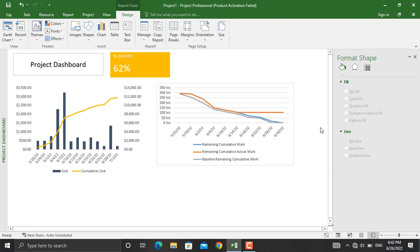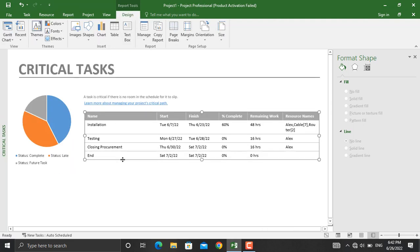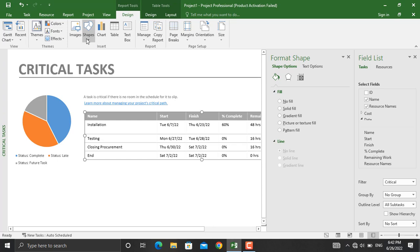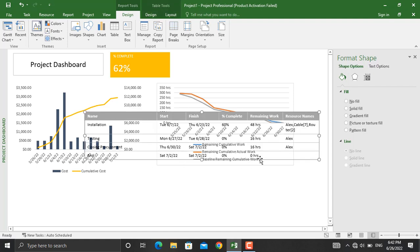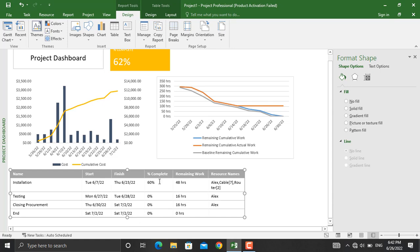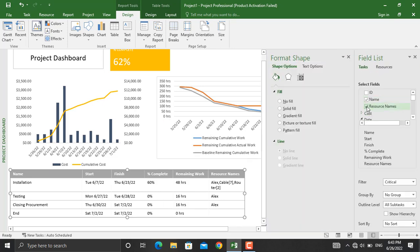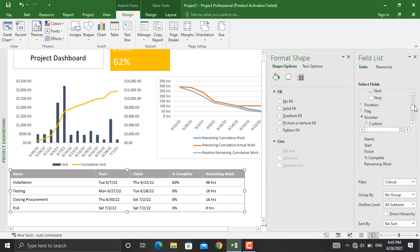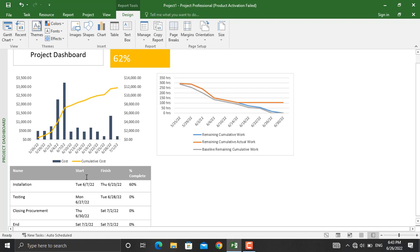Next, let's add the list of critical activities. Go to Report, then In Progress, and click Critical Tasks. Copy the table and paste it into the Project Dashboard using Ctrl+V. You may not want to see all fields — we only need the task name, start date, and finish date. To customize this, right-click and select Show Field List. Remove the resource name and the remaining work fields, leaving only the name, start date, and finish date. Further formatting can be applied as well.